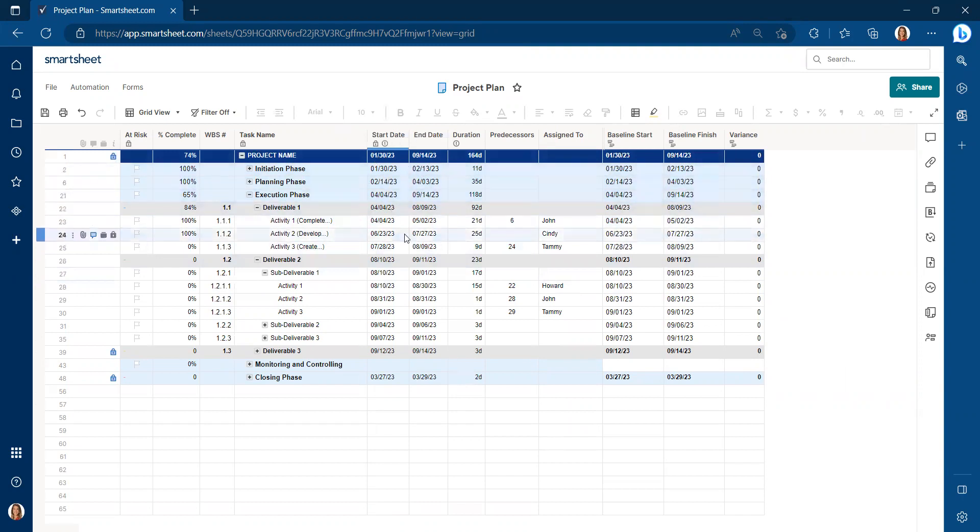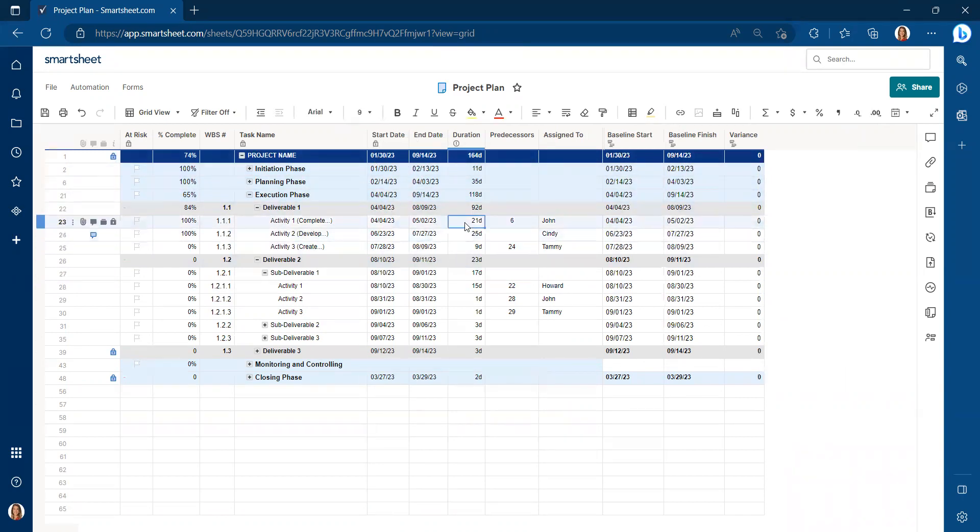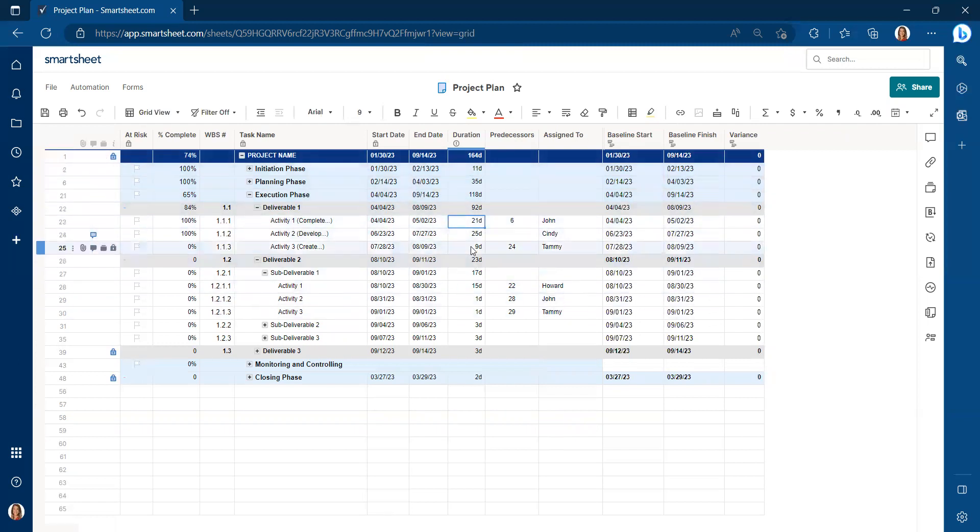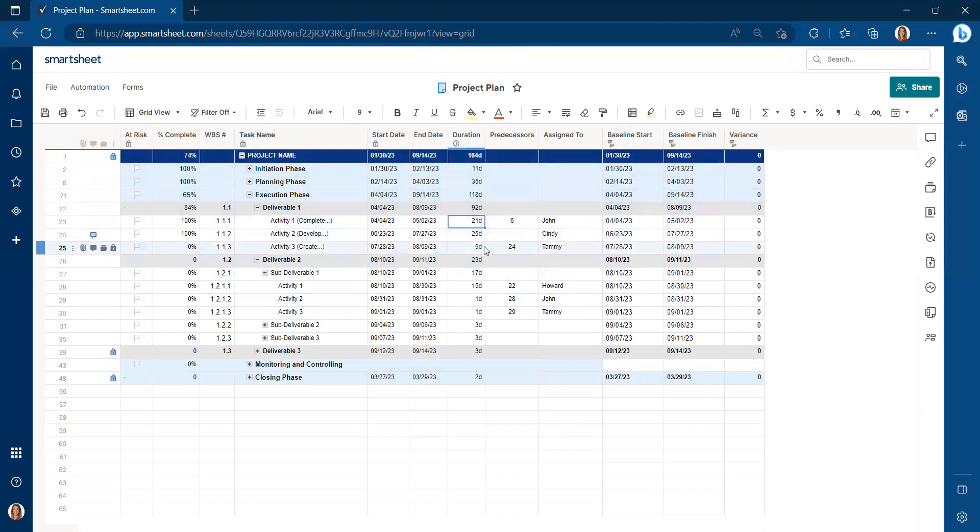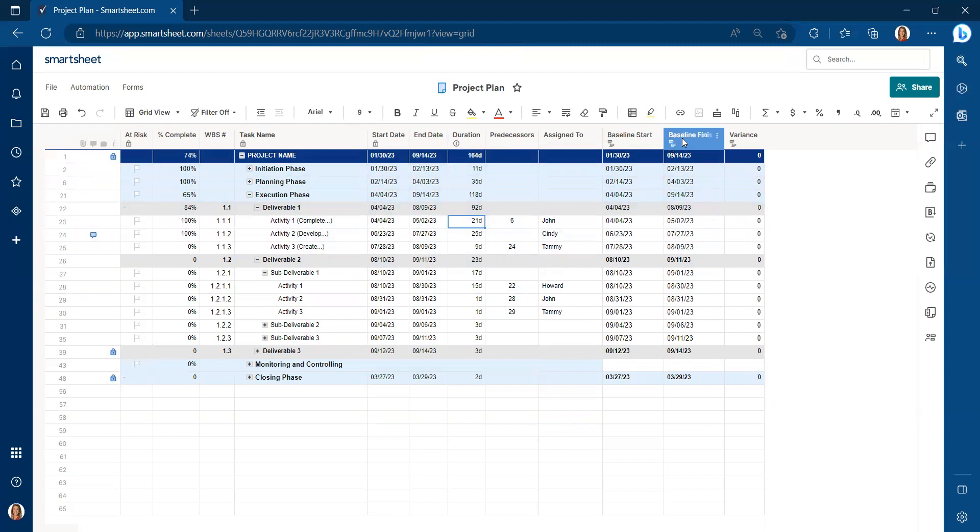So when we have logic built into our schedule, the best way is to increase or decrease the duration of the different tasks. And so we would adjust that as needed. And now our baseline start and baseline finish directly relate to the start date and the end date. There's zero variance now for our project.